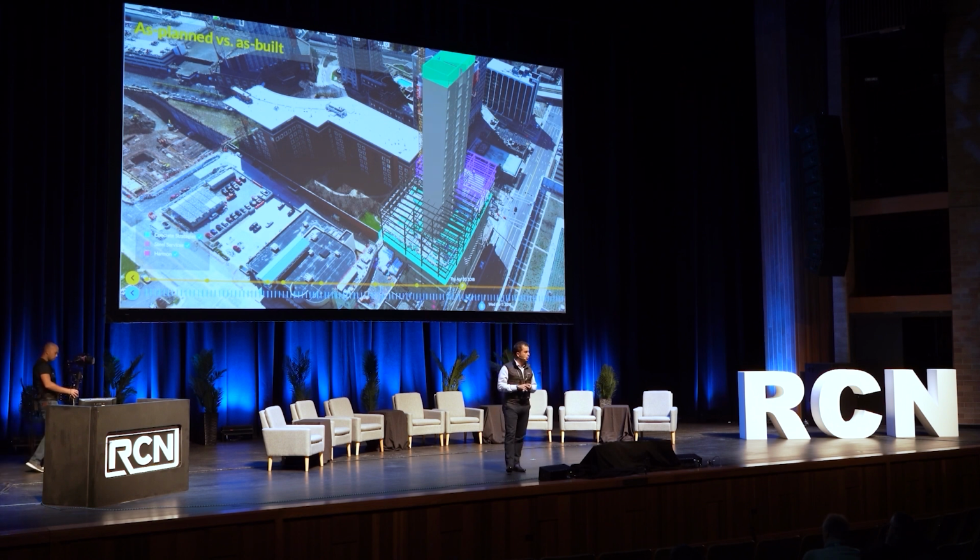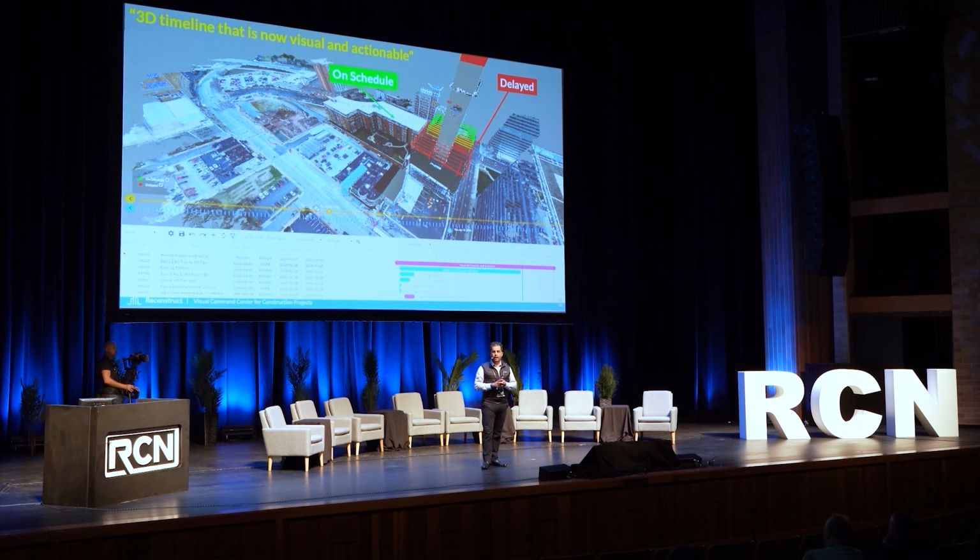Immediately you can see who promised to do what work in each area every single day. The model carries the quantity of expected work. The picture in the background is measurable, so you see the actual quantity against expected quantity. And of course, over time, with user input, which I'll explain later, you'll be able to update the basis of this environment and have different work locations, work packages, or tasks color-coded based on traffic light metaphor. Behind the schedule red, on the schedule green, and you can obviously see the schedule at the bottom of the screen.